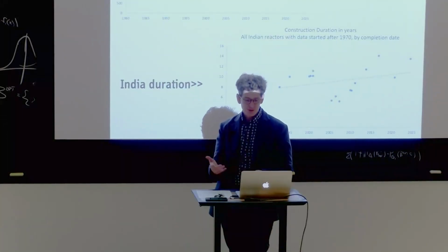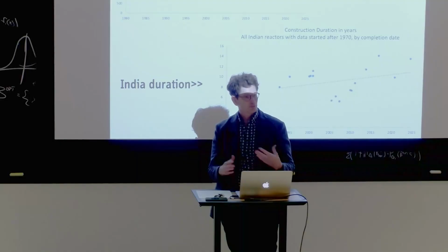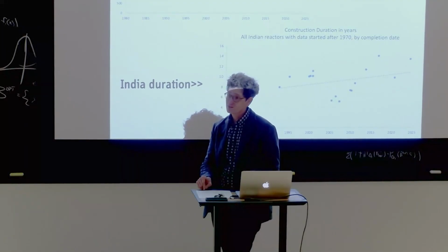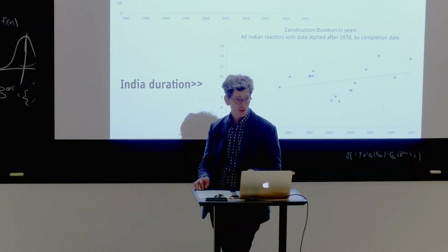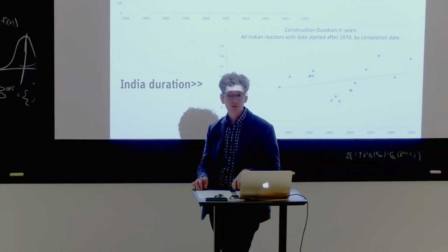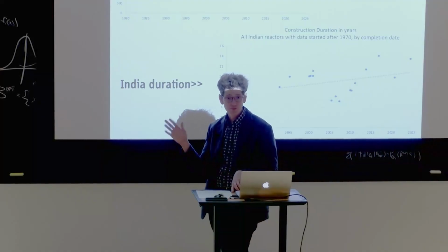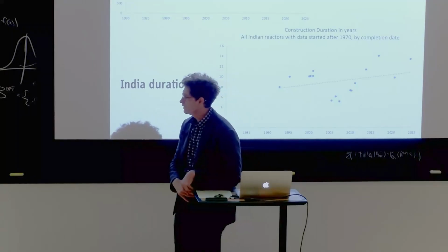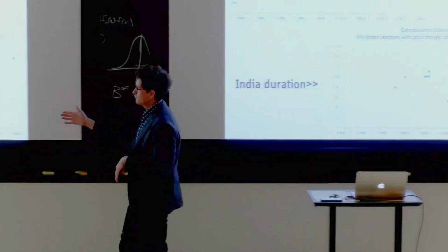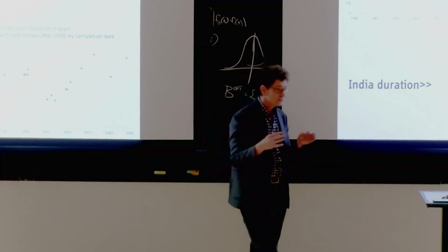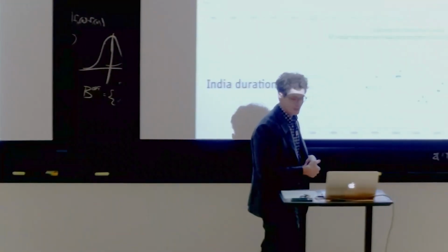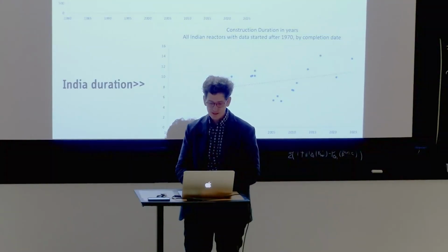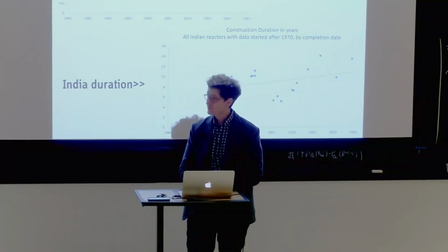And that probably results in basically fewer errors during construction and better safety. And indeed, India's fleet is one of the most reliable in the world. They're down only 4.4% of the time compared to the 23, 25% you see in other countries, 40% for Japan now, right? So this slower method of construction appears anecdotally to be related to this high availability, high safety record that India has at the moment.